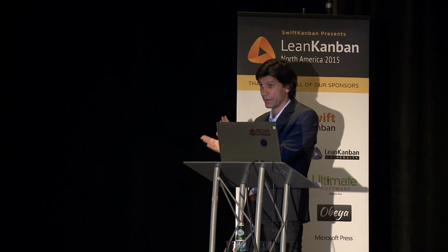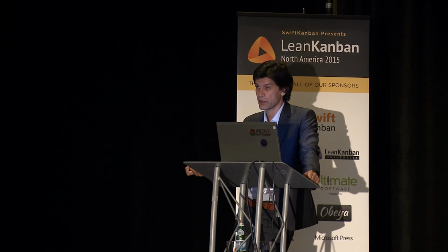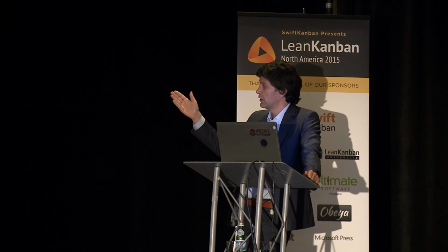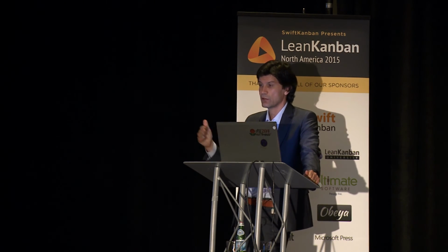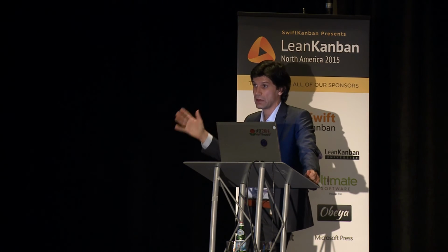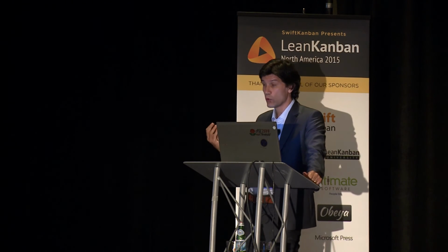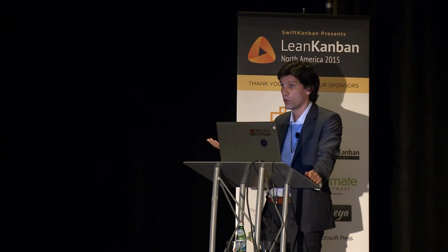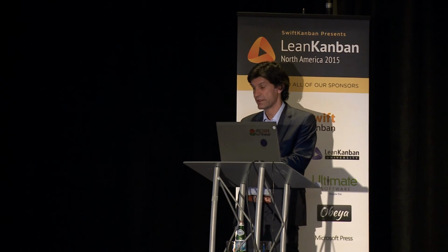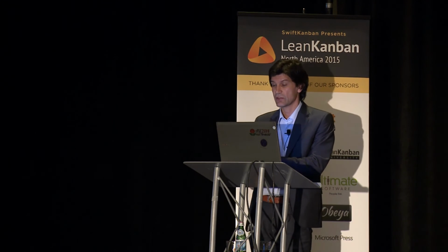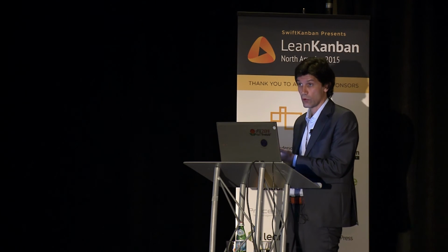So what you can do is, when you run RBS, you go to the customer and provide the quote. Let's say our project is 2,000 user stories, and we have some data that shows that our team will deliver in 2 months, right? And then after 2 months, when you are ready and you know the real number of story points that actually came up, you can compare the actuals with the estimated. That's how it should be done. First of all, to see if the technique RBS works at all.